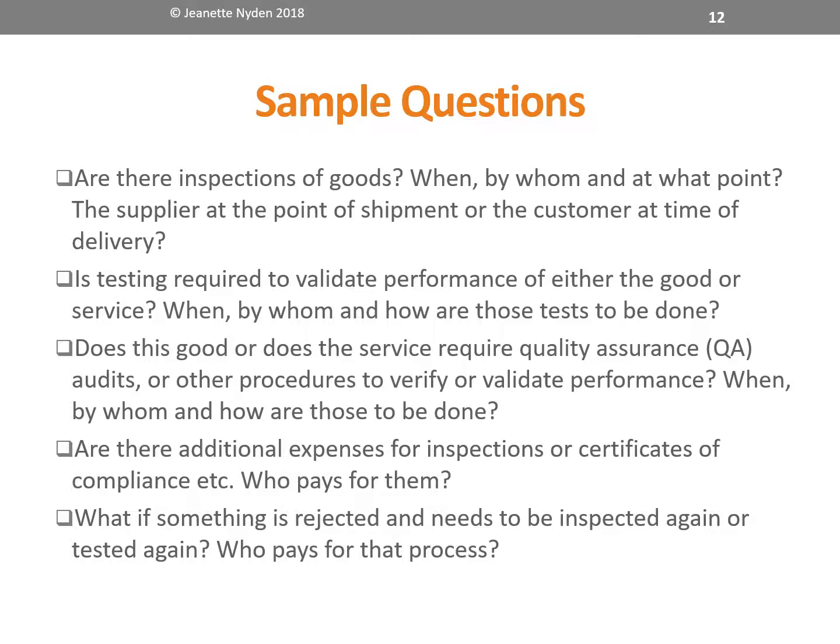This is a big deal when my customer has to fly out at a specific date and time with a team of people to inspect something, and that something isn't done. That's how this whole contract management comes into play. What happens when they get on the plane and they're in South Carolina and they determine that the product isn't done, it doesn't meet quality assurance, it's quote unquote defective as it's determined in the contract? Who pays? How does the schedule get impacted, etc.?